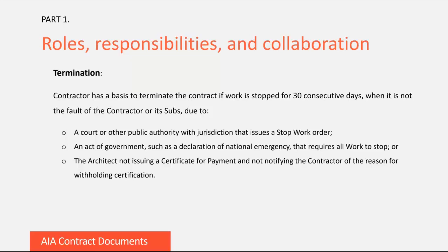When negotiating a termination provision in your owner contract, it's a good idea to require a termination fee in case the owner terminates the agreement for its convenience. Ultimately, if you're unable to have the owner agree to this, it can still be raised as a bargaining chip in the back and forth negotiations.